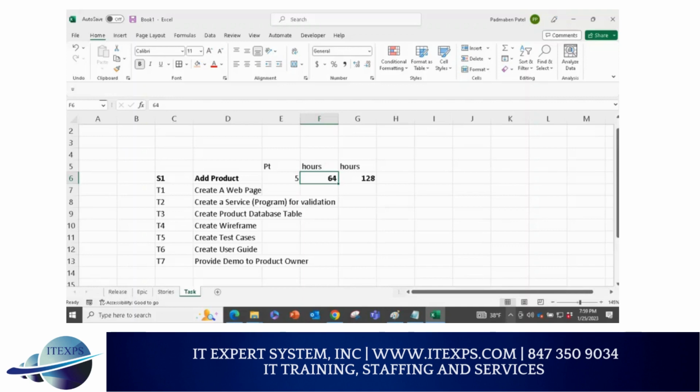You need to be active and genuinely putting effort because this is a fast speed train. Everyone is going to do high performing. Everyone wants to do more. So it's very important you have rules clear. So right now we have parameter clear. 5 point means 64 minimum hours and 128 is the maximum hours.